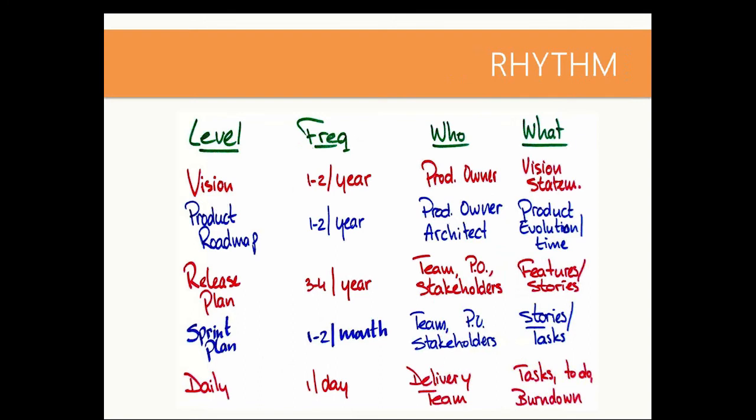If we look at how the release planning is done, that becomes a lot of information. And when I did this in the insurance project and with other large organizations, it's got something like a full year Gantt chart with multiple teams and lots of high-level requirements on it.